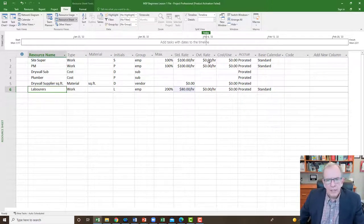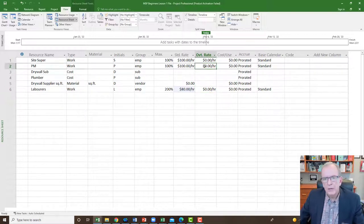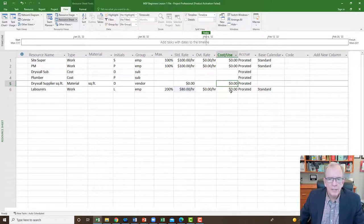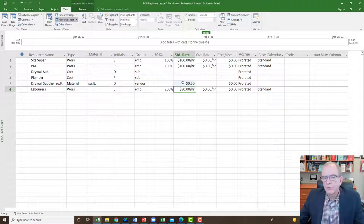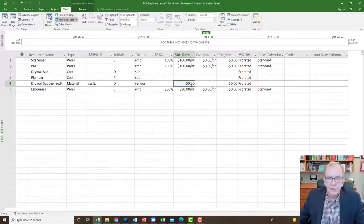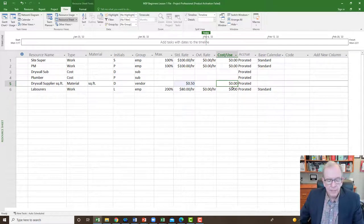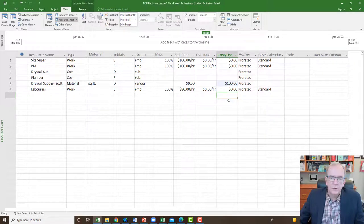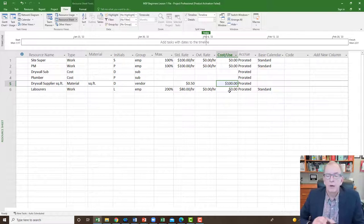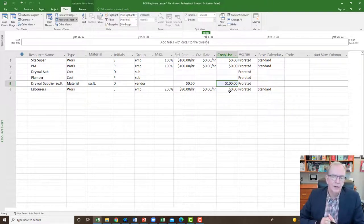There is an overtime rate field — I won't get into that now, but you can assign a different rate for work over certain hours. Cost per use is not used that often, but here's an example: if drywall supplier charges 50 cents per square foot, 10,000 square feet costs $5,000 — but maybe every time they deliver there's an additional $100 delivery charge. You'd put that in cost per use, and every delivery regardless of quantity would add that extra charge.